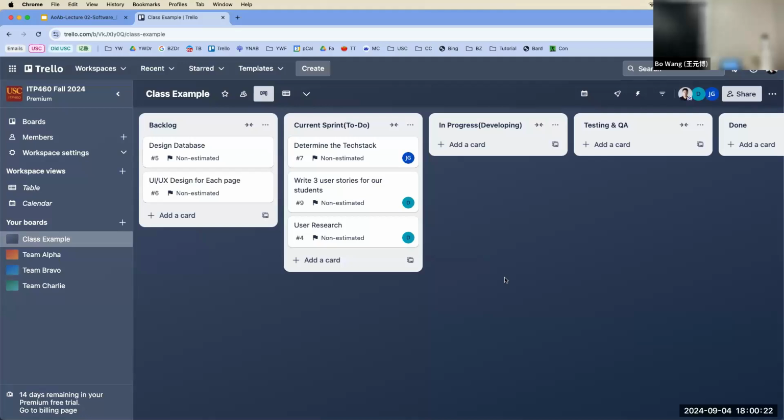Does that make sense? So we do not want to assign working hours to each task, because each individual will do the same tasks differently, as their abilities are different. But within the team, we still want some unit of measurement for the complexity of a task.